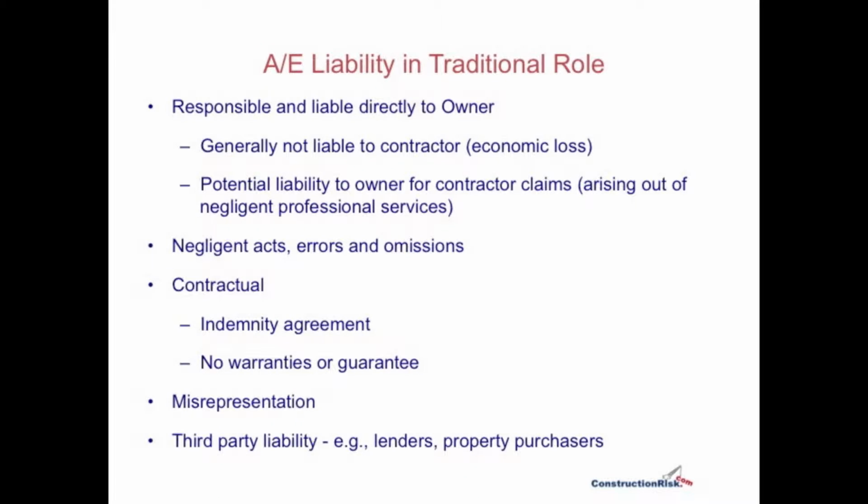There's also potential liability for misrepresentation. So we do see project owners sometimes suing the designer for misrepresenting either the quality of the services, what the services would accomplish, etc., or the budget, etc. And then occasionally there is third-party liability to lenders that loan money to the project owner, and they claim that they relied on perhaps the payment application reviews and approvals by the designer.